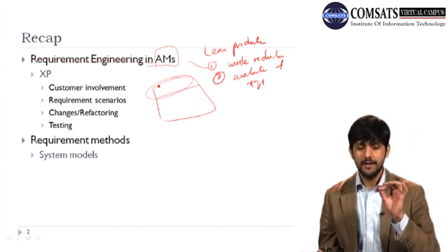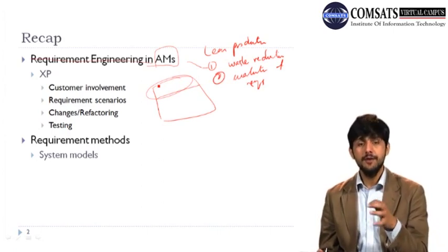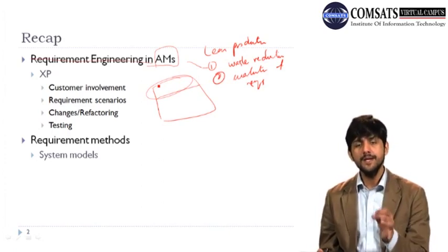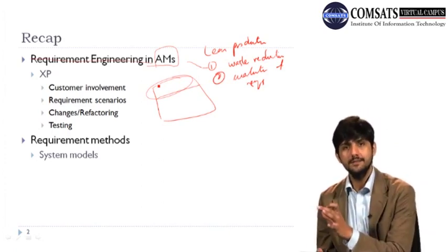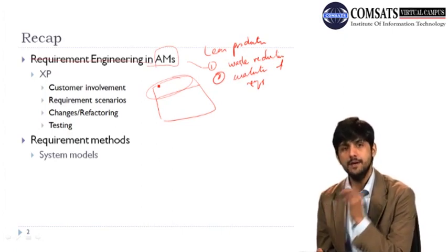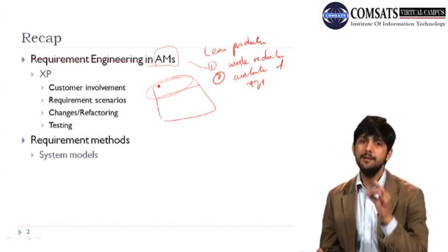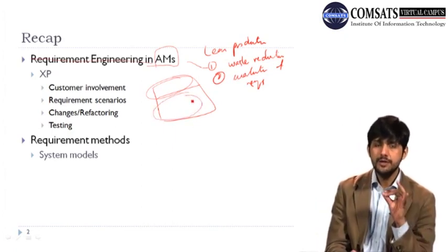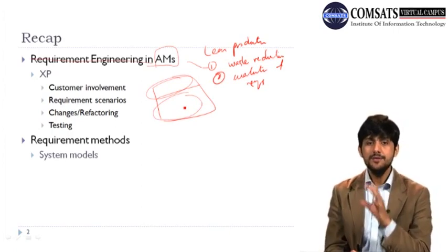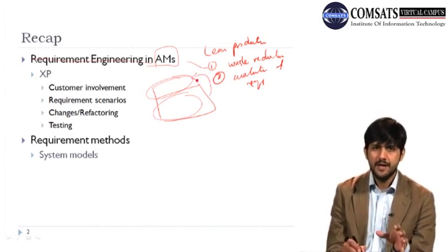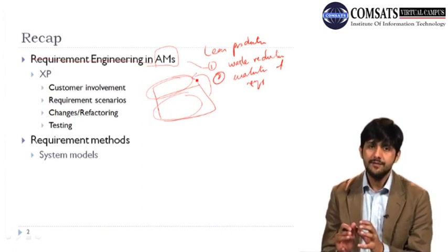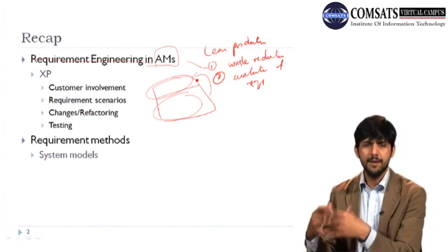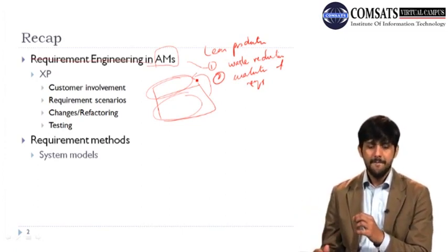And remember, we talked about that waste reduction is achieved by frequent increments and splitting the requirements. So a user story belongs to one process, or it should talk about one set of features. Remember, the example that we discussed was downloading and printing an article. So it had all the different tasks which your system needs to do in order to actually complete that particular functionality. The first one was displaying an article, then selecting an article, displaying the payment options, and then the payment process as well. So there were different tasks.